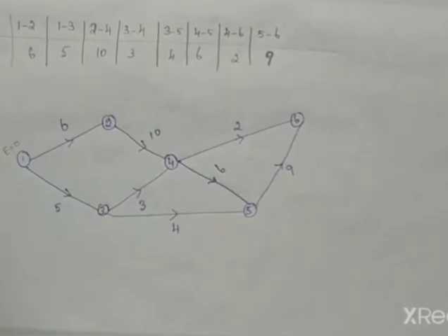Next we find the second activity. For calculating the E value, we have to see how many incoming activities there are for that node. Suppose you go for the fourth activity, then see how many incoming activities the fourth has. The E value is calculated from the incoming activities.